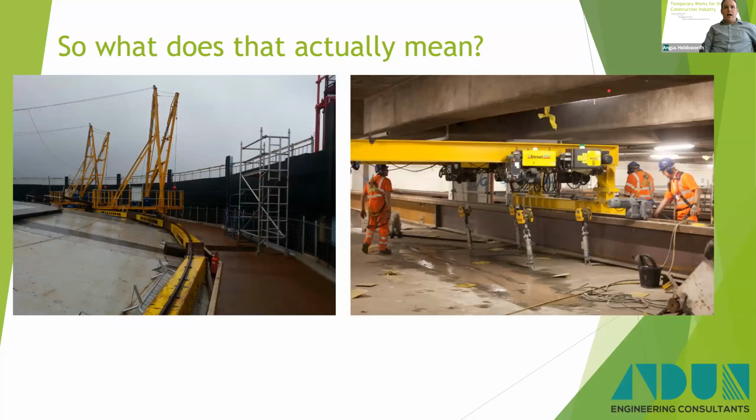The way that was done was quite unique. These crane rails, large crane rails which we designed, were slid into the structure and these gantry trains were put up, and then the structure was cut into pieces and wheeled out the far end of the structure straight onto the back of the lorries.